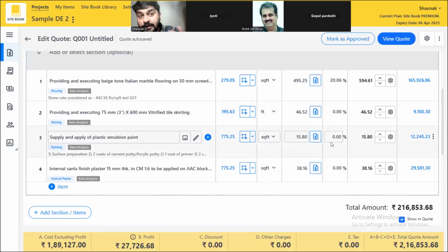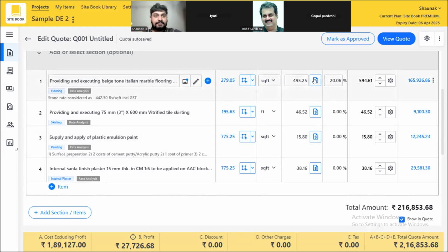So we have developers who are using this, where they will make an estimate. They will clone that project along with quantities. In the other estimate, they will change a few specifications and they have two sets of costs in front of their management. Contractors and interior designers can use this in a different way, where they can raise variations or change orders within seconds if they have their own rates ready. We will obviously have these rates, but if they want.